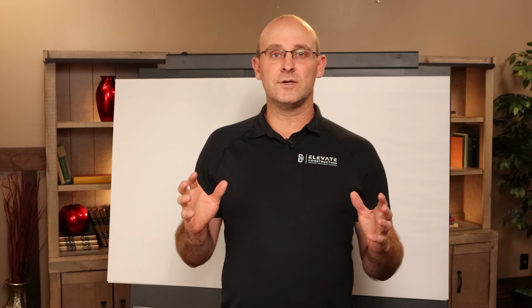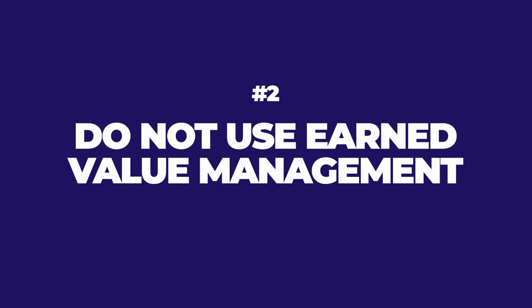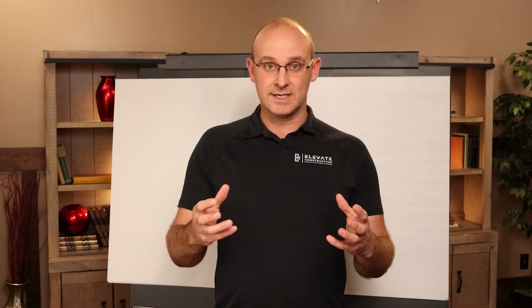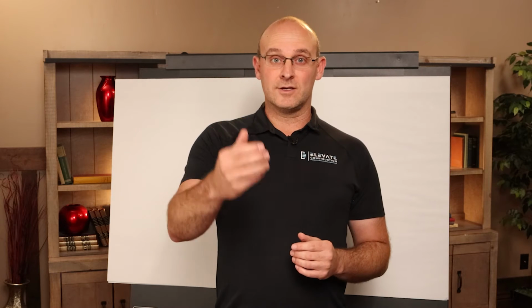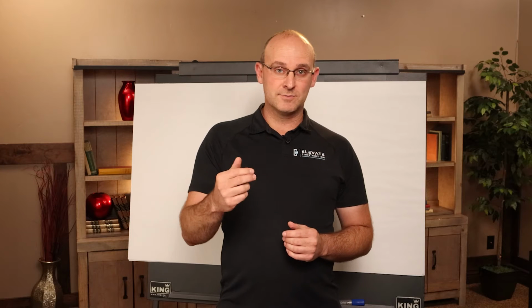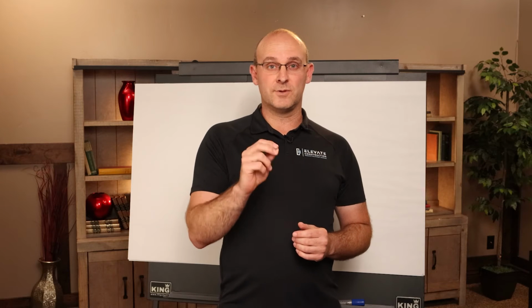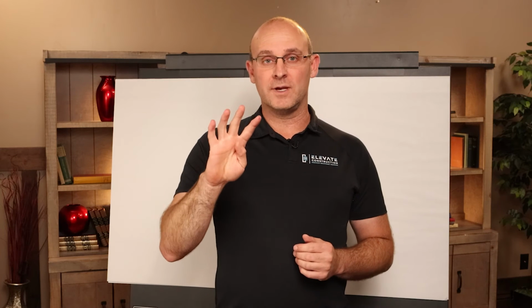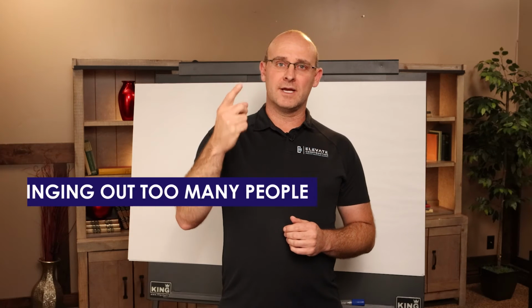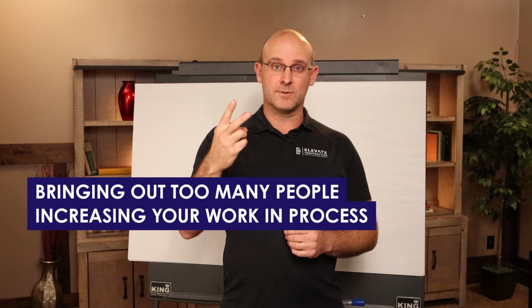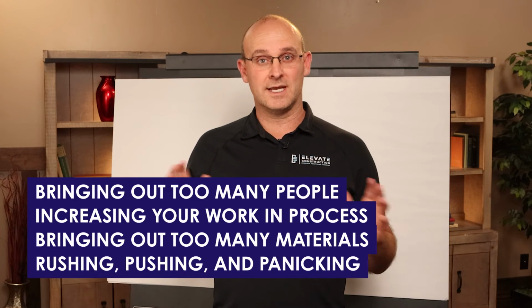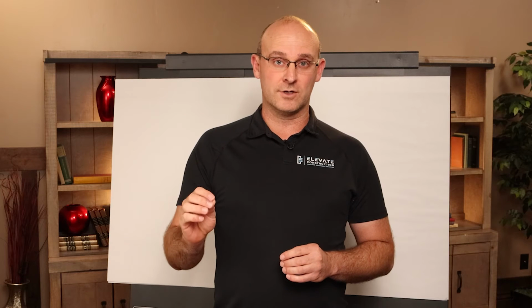The other thing that you should not be using is EVM, Earned Value Management, where you measure the progress of a project by how much money you have earned and spent for materials and by how much money you have spent on contractors putting work in place. And again, this is incentivizing you to spend more money faster, which actually gives you all four of the major causes for production loss, which is bringing out too many people, increasing your work in process, bringing out too many materials, and rushing and pushing and panicking, and that will extend and panic your job as well. So EVM is not a good measurement.